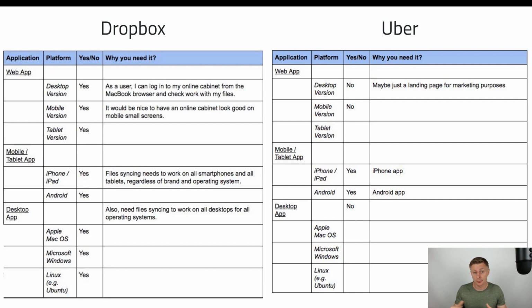So after the project roadmap module, we will have for you a detailed work breakdown structure with an accurate estimate for each task. If we see that tablet adaptation takes, let's say, no more than a couple hours or 1-2 days, we might include it into our MVP version as well. It all depends on your budget and time limitations.